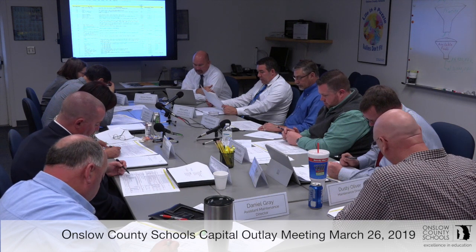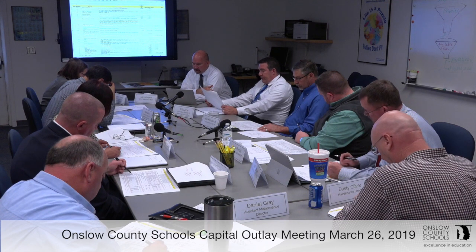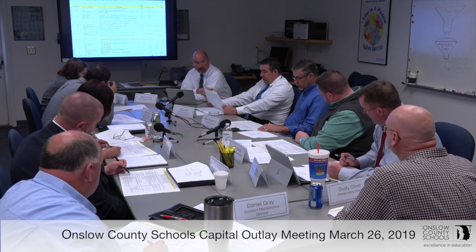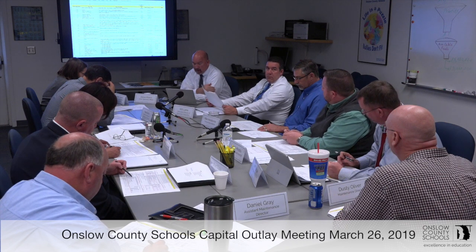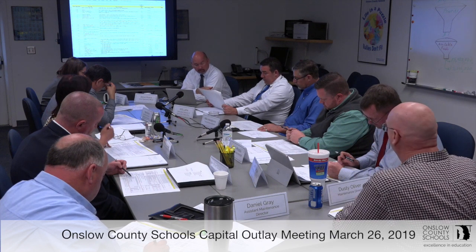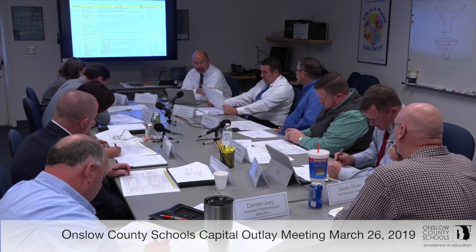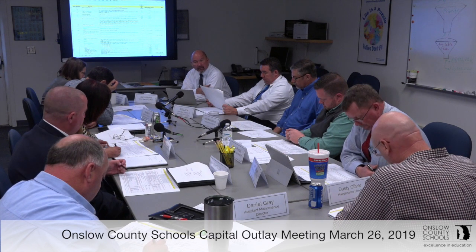So the vocational building was the 11th most urgent roofing project need, and so we said that from the 12 most urgent roofing needs, it would be looked at for completion next year. Then we went to the media center, which was the 17th most urgent roofing project, and we said that needs to be done within the next 2 to 3 years. Building 5 and Building 3 are the 27th and 28th most urgent roofing needs, respectively, and so we're saying that needs to be done within the next 5 years.